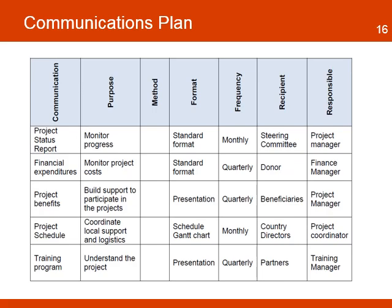The communication plan will include a simple matrix for different types of communications. The first column identifies the type of communication. The next, the purpose of the communication. The next column is the methods for delivering the communication. The next is the format and the frequency of the communication. The next column identifies the recipient of the communication, and the last column identifies the person responsible for preparing and sending the communication.